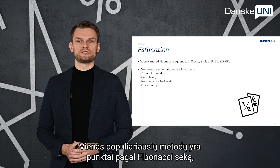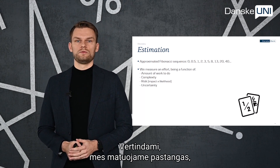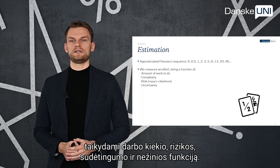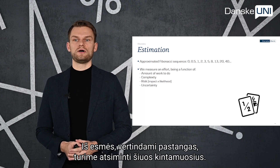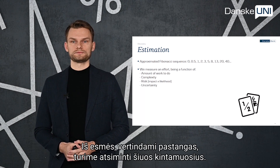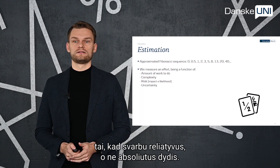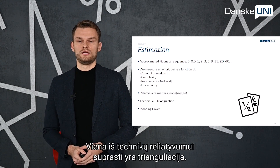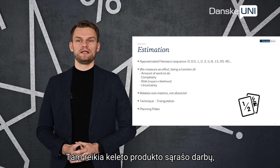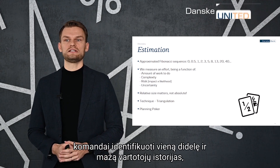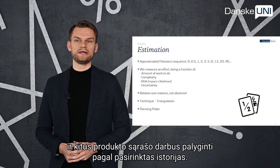One of the most popular methods is story points based on the Fibonacci sequence, because it prevents estimates from being too close to one another. When we do estimation, we measure effort, which is a function of amount of work, complexity, risk, and uncertainty — these variables should be taken into account when thinking about effort. Also, what is very important and takes time for teams to understand is that relative size matters, not absolute. One technique that helps to understand the relative concept better is triangulation: it requires a bunch of backlog items, the team identifies one small user story and one big one, then estimates the rest by comparing them to the chosen ones.